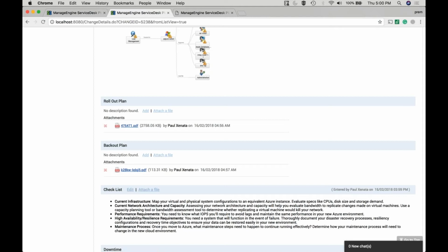All right, we have a rollout plan, but can we go ahead and directly do an implementation? Not really. It's not recommended. You should always have a plan B as well. Sometimes things go south on us. It'll go undesirable. So we should have a plan B so that we can put it back to the previous working state at least. So to achieve that, you have to create a backup plan as well. So the backup plan will have the plan to reverse the change activity if you could not do it within the downtime that we have planned. All right. Question time.